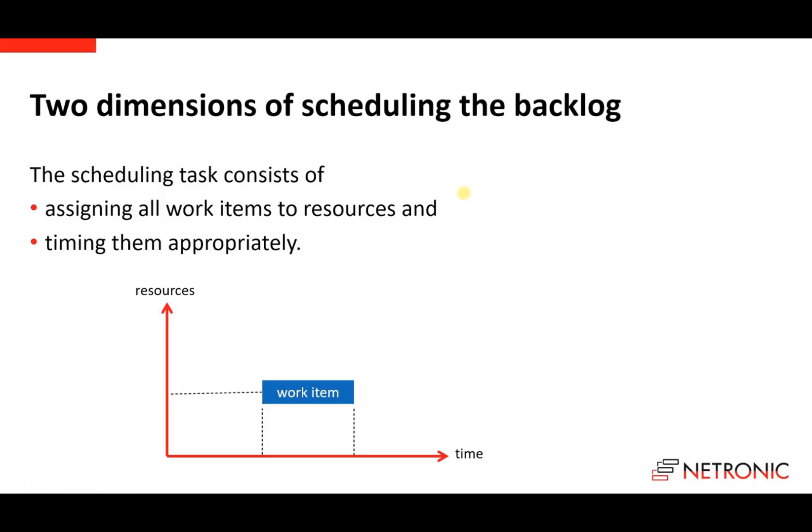Both steps are not independent from each other. For example, it makes no sense to assign a work item to a resource when this resource is not available in the respected time range. And it depends on your application and on your way to schedule backlogs whether you first assign a work item to a resource or you first specify the position and time of a work item.